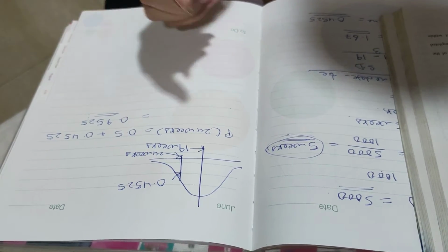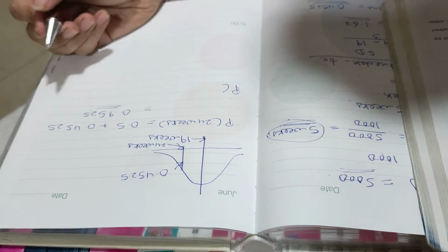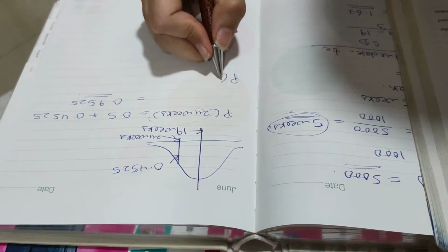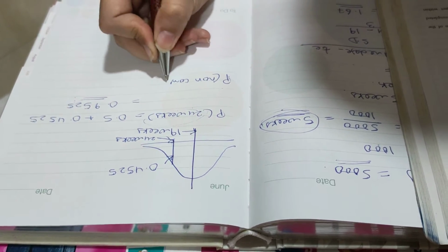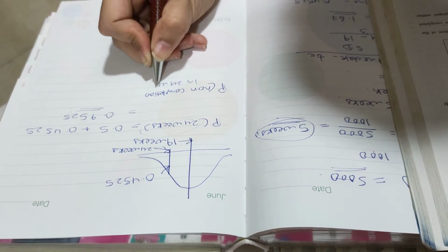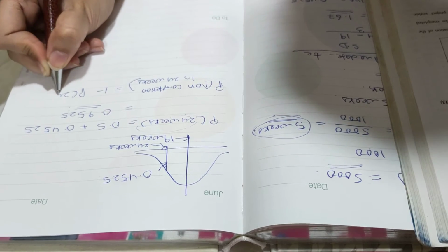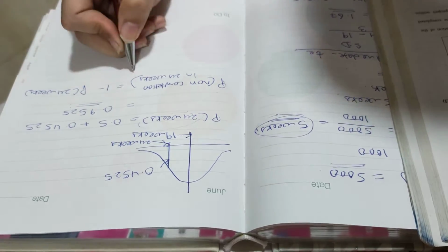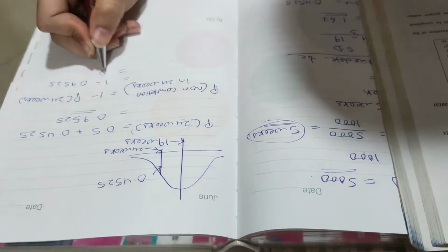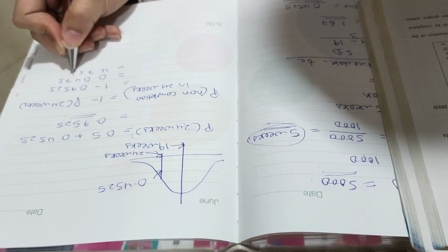हमसे पूछा है more than 5000, right? So how we will write probability more than 5000 कभी होगा, जब भी मेरा काम 24 weeks में complete नहीं होगा. तो we will find non completion in 24 weeks, that is 1 minus probability of 24 weeks, that is 1 minus 0.9525, that comes out to be 0.0475, that is 4.75%.